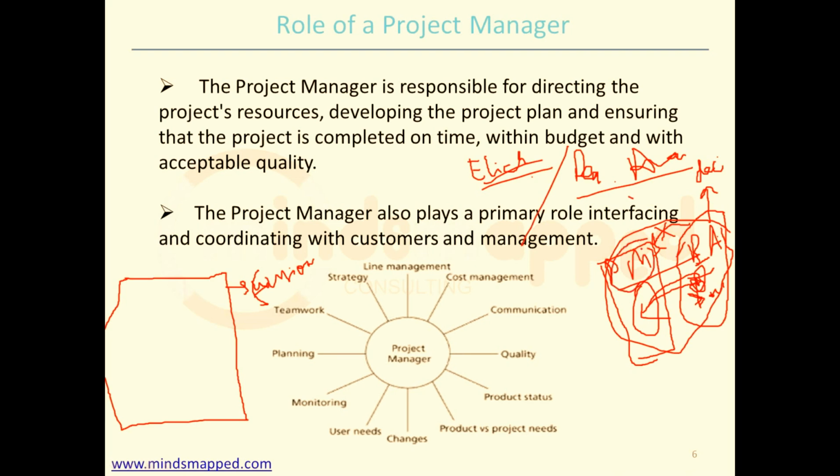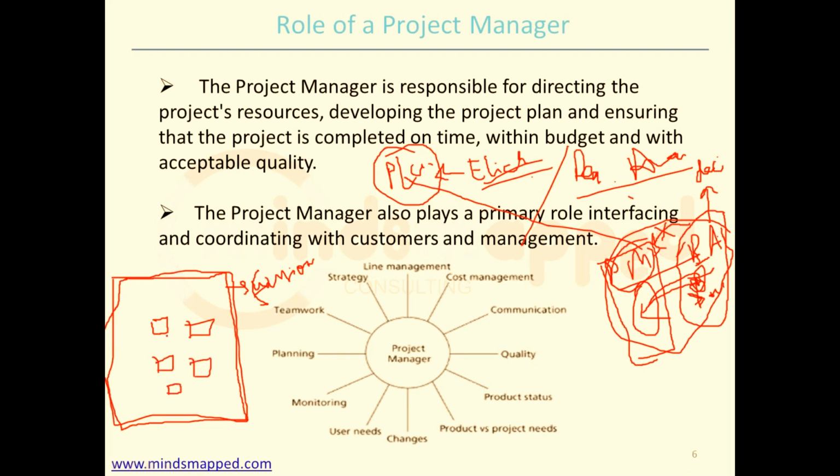The PM will not be part of that, although the PM would be part of project planning, which comes prior to your elicitation activities. He would be the one defining the scope. This boundary line is something which the PM would be deciding. But the boundary line for your stories in fusion, what all the subcategories would be there, the boundary for each and every user story or each and every elicitation requirement, is something which would be decided by the BA. So just remember, the boundary of the BA scope will always come under the boundary of the PM.